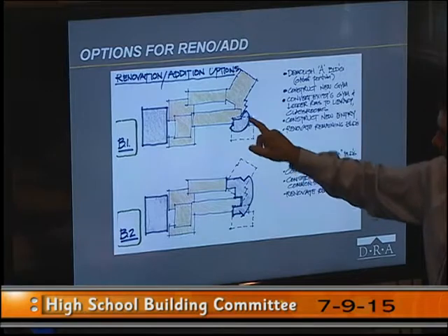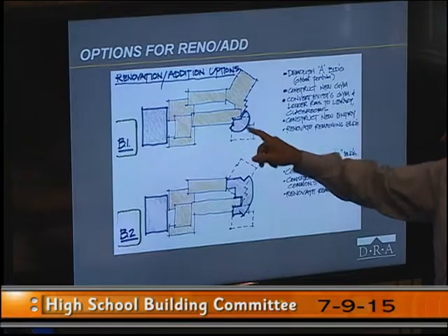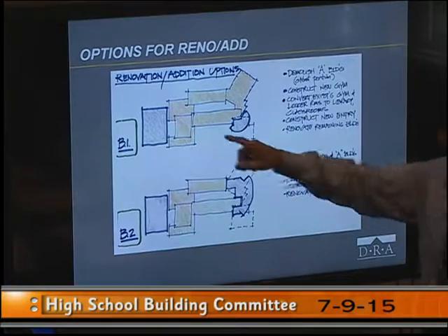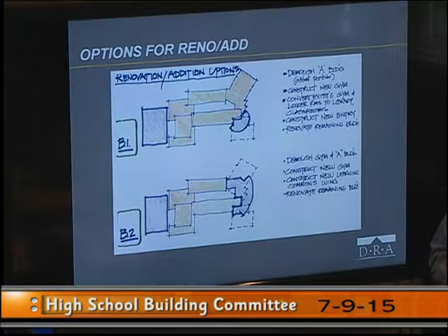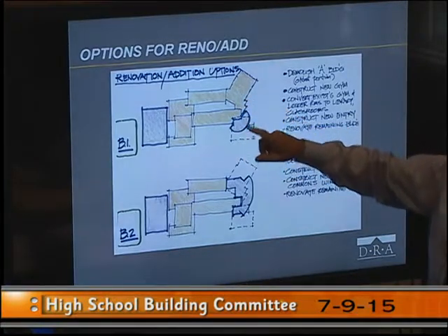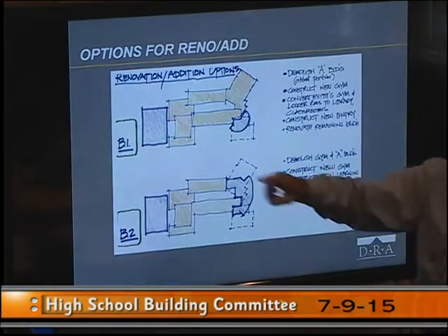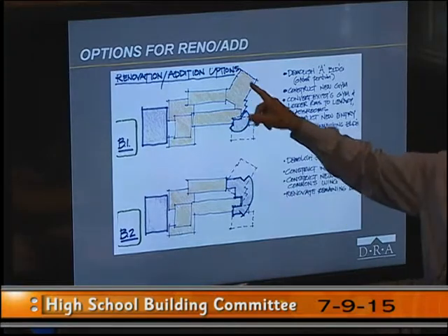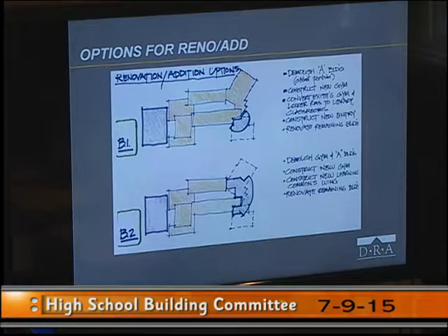It's only demolishing the oldest portion of the building, so-called A building there, replacing it with what might be a new entry. And it builds some new space on the parking lot side of the building, to the, I think that's east actually. And it may be that this new piece, and it'll sound familiar to Roberta, is a gymnasium, and we take the old gymnasium and turn it into a library. And that's a way to salvage as much of the building as possible. That's just on a theoretical basis, without doing much more than that, that's one option.